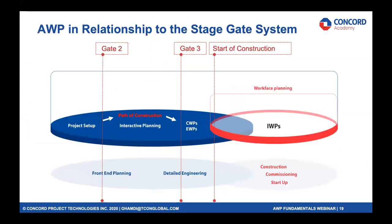With that breakdown, we translate it into a work breakdown structure and a numbering structure that is propagated across the entire project documentation — from procurement to engineering to field — and all documentation that feeds into these packages.